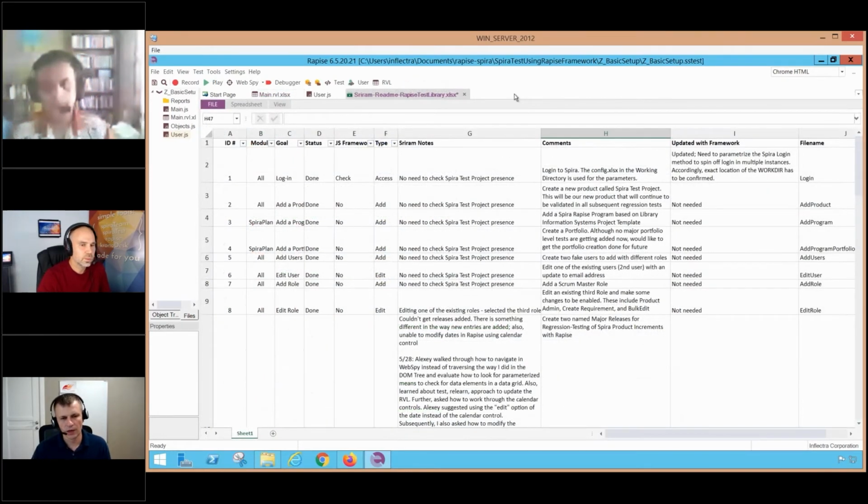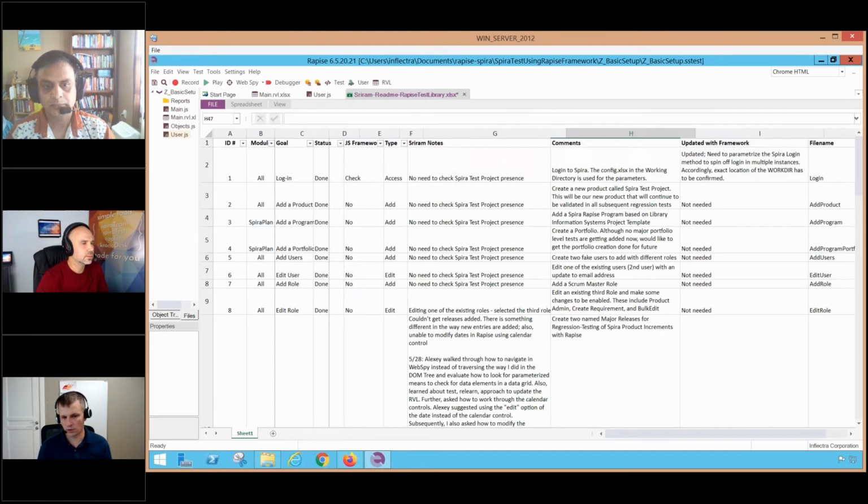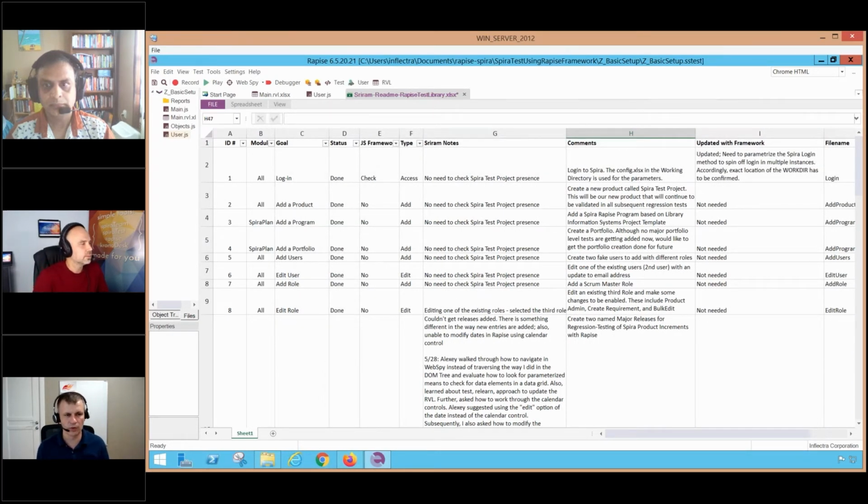What I wanted to comment here is you see that the work was done in many directions in parallel. So there was work on logging, there was work on editing a product or editing a program, and you see there were comments. So not everything was working perfectly from the beginning, but it was working to some extent, and the work was not blocked due to some missing feature. So the common mistake that we see is that people start implementing some scenarios one by one, end to end, and they get stuck, say, on scenario number 2, and put all their efforts into trying to resolve that.